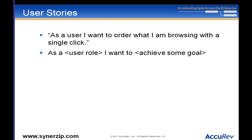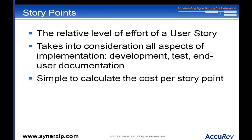Much like requirements, a defect or enhancement request needs some estimate of how much work it is so we can figure out the cost. A common thing to do in agile — and something I highly recommend — is to use story points. Story points do not equate back to time; we calculate time indirectly. Story points measure the relative level of effort of a user story, taking into consideration all aspects of implementation: development, test, end-user documentation, GUI work, back-end schema design, middle tier — whatever you need to do.